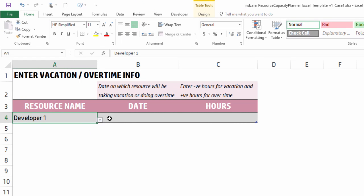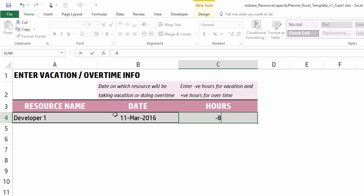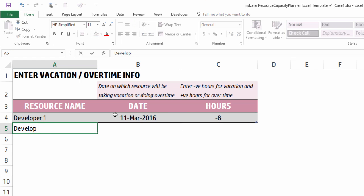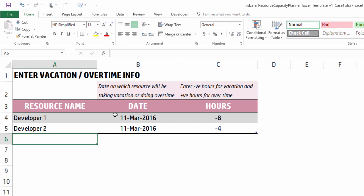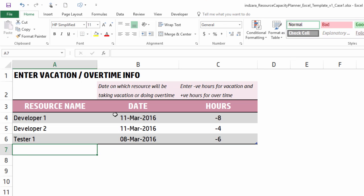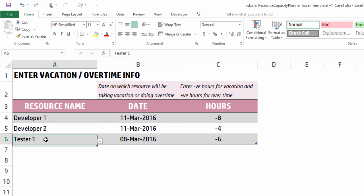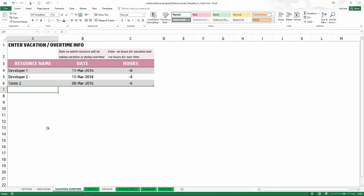Now let's go to the vacation and overtime data and enter any planned vacations. Developer 1 is out for eight hours on a specific day, so I put minus eight. Developer 2 is also out that same day and usually works four hours, so I put minus four. Tester 2 works six hours every weekday and is taking vacation on March 8th. We'll keep it simple with just three vacation entries.